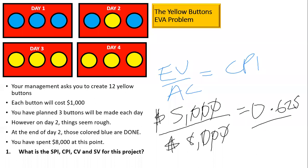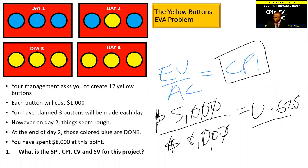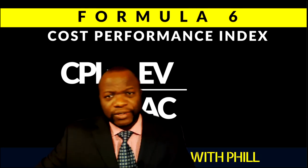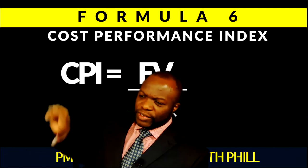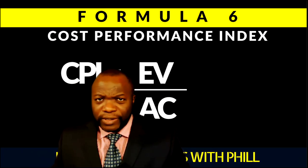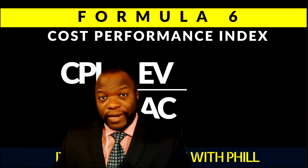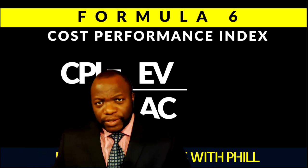And that, my friends, is how you calculate the cost performance index. It is a very good measure of cost performance across the entire project, and it's good to compare performance across projects of various sizes. So if on the exam you ever get the question about which is better for cost performance, think about this: CPI is universal — cost variance is great, but it is not as great as CPI because CPI cuts across all projects of various sizes. See you in the next one.